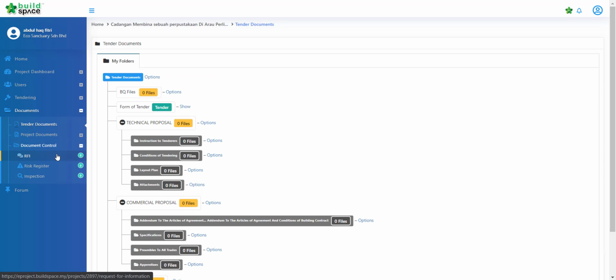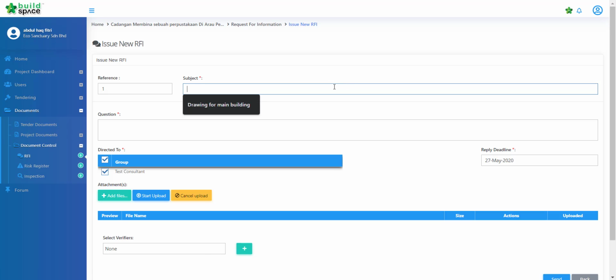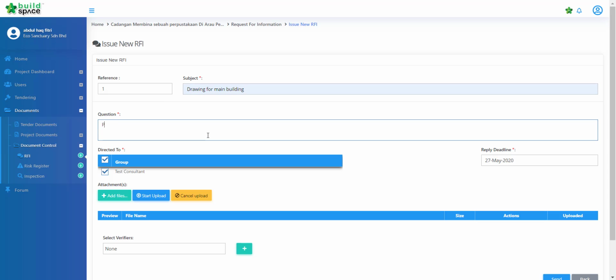So if you want to issue any RFI, so let's see here the RFI. So click here to issue new RFI. Then enter the subject, following with the questions. Then we select the group to be delivered to.